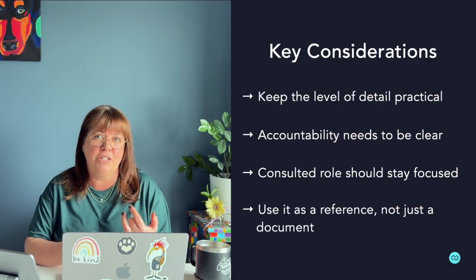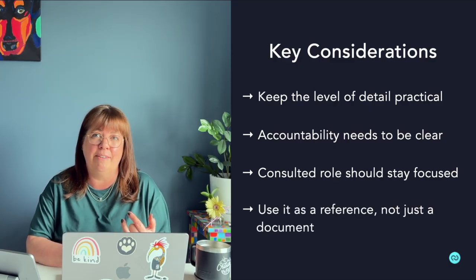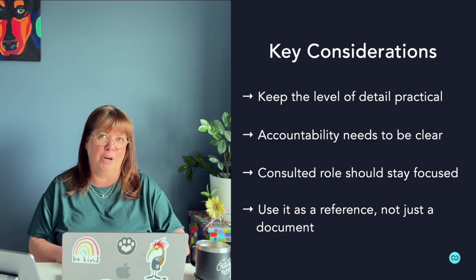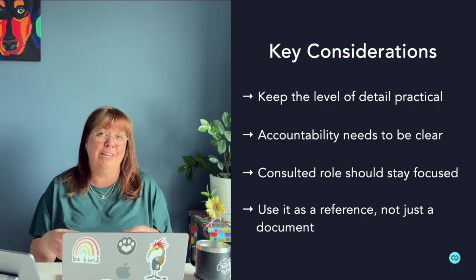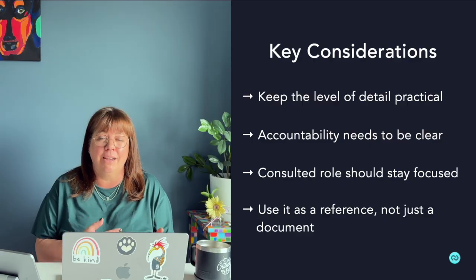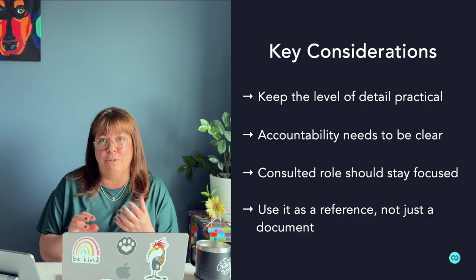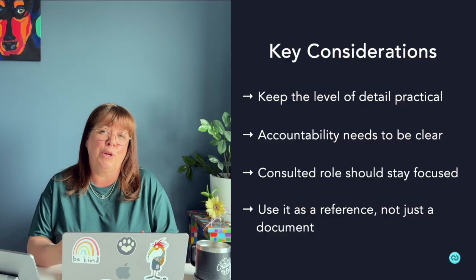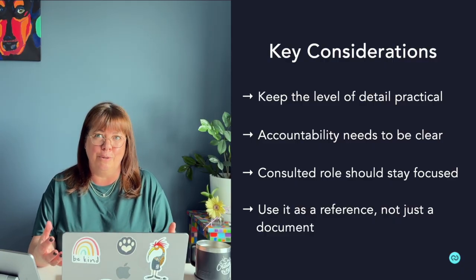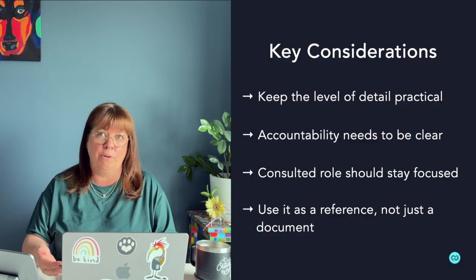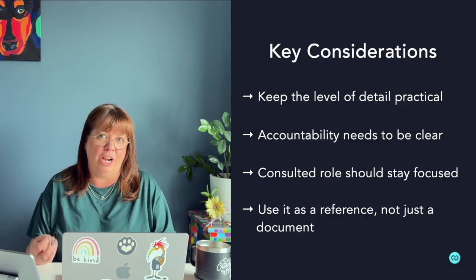And the final one that I'll mention is creating a RACI and then never looking at it again. If no one's using it when questions come up, then it's not helpful for the project. So they are meant to provide clarity, they're meant to be referenced. If they need to be modified along the way, if additional changes or things come up, and you recognize that there's more groups that need to be added or roles that need to be shifted, then that actually needs to happen. But they should be a living document that's frequently referenced and placed in a location so it's easily accessible to anyone who's on there, including all those people who are informed. It really is meant to be a shared reference point.